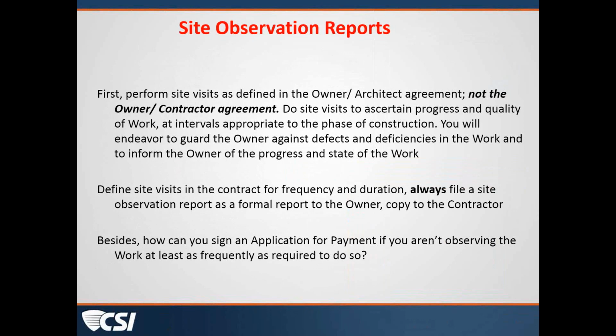So what are we doing during the construction phase related to site observations and site visits? Well, first of all, these are defined in the owner-architect agreement, and they are not in the owner-contractor agreement. This is an obligation between us and our client, our owner.